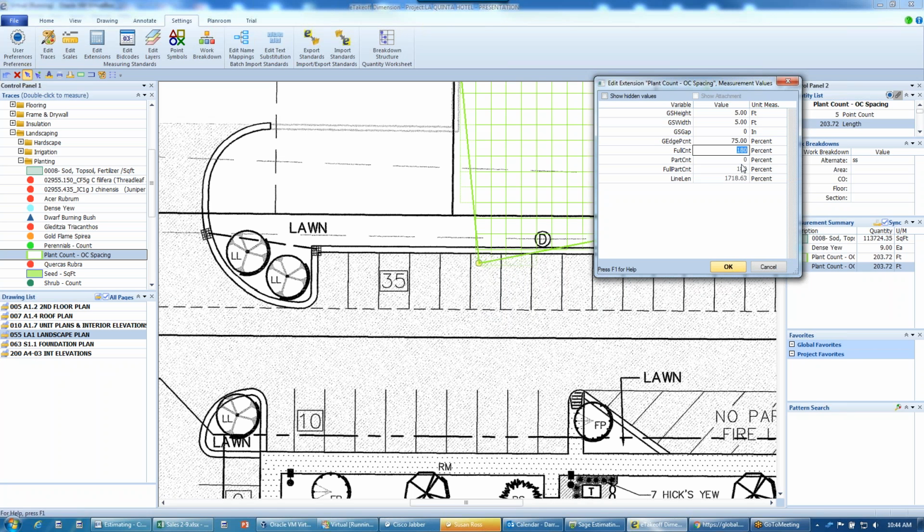So is that what you're kind of referring to when you get a square footage area and you say, based upon 1 by 1 or 2 by 2 or 5 by 5 on-center planting, give me the number of plants that's going to represent? Yeah, a lot of, like the plan you have out there, looks like it was done by a landscape architect that's calling out all the plants. And the areas we do are fairly large. And the people who come up with them are biologists or some other type of consultant that just works off a certain amount of plants per acre to get an overall coverage, but we have to go back and figure out exactly how many are actually in there.